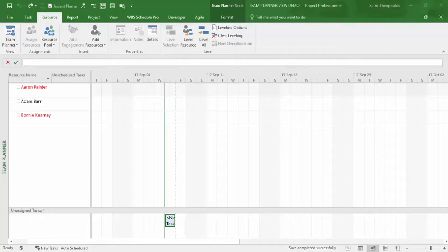Here I will edit the task that I created a few moments ago and define it using effort. I will enter 48 hours of effort, which is equivalent to 6 person working days. My system is set up with a working day consisting of 8 hours. However, you are free to set it up differently to meet your needs. Also note, you can enter duration or effort estimate values down to the minute if required, or in weeks, etc.